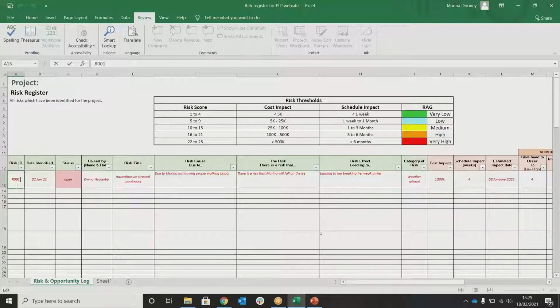When it comes to senior meetings, you can use this risk register to produce a dashboard, and those numbers become very handy when you're plotting them on a heat map. You can just put the numbers rather than the full title of the risk, and create something that's visually easy to read and gets the information across quickly. So you were telling us that we need an ID.